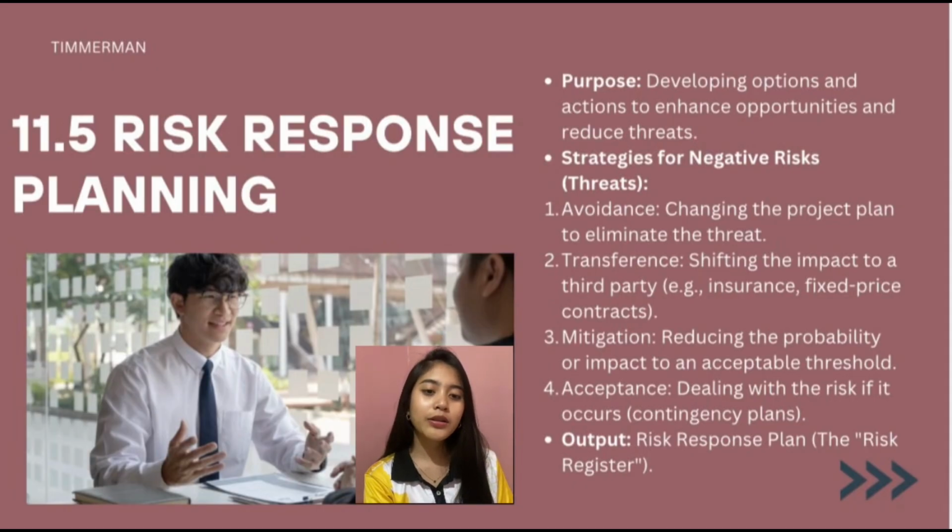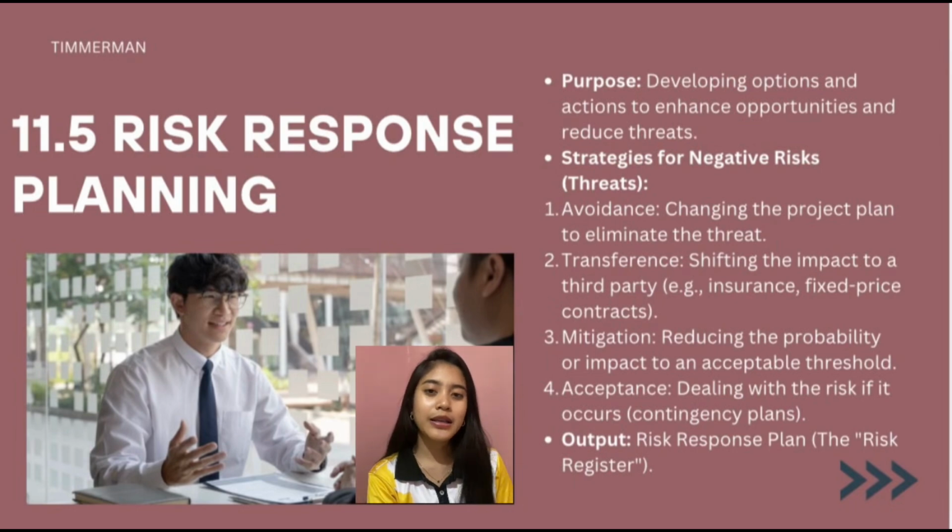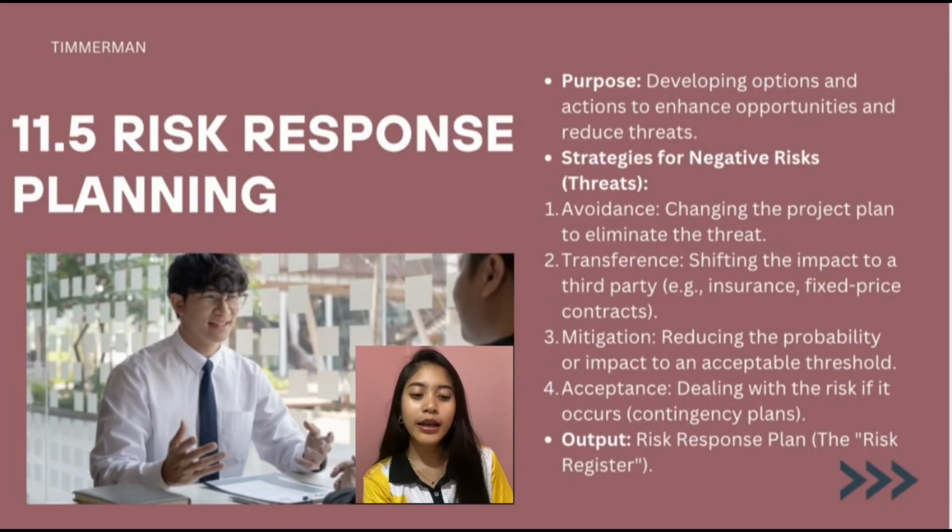And then the third strategy is mitigation. So reducing either the probability of the risk occurring or its potential impact. The goal is to bring the risk down to an acceptable level. And then this might involve additional testing, improved planning, or implementing safety measures.